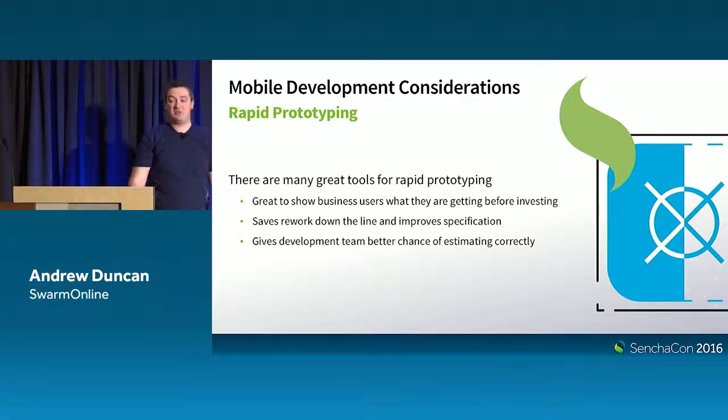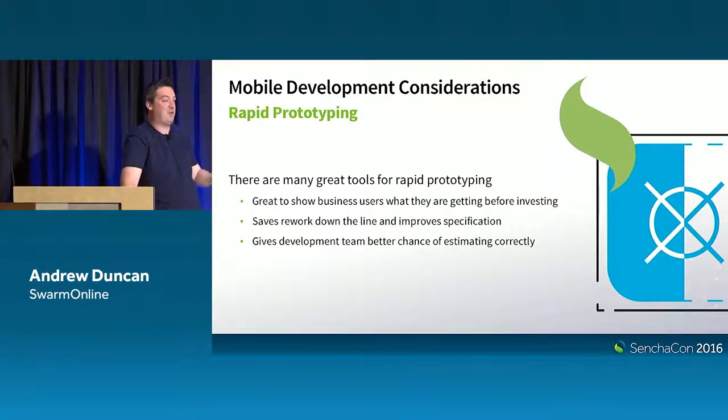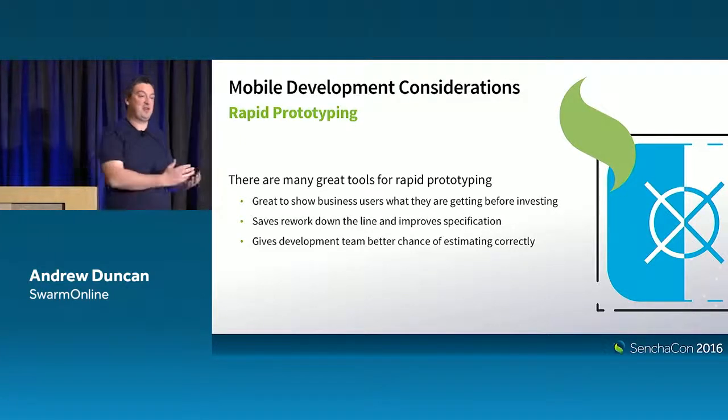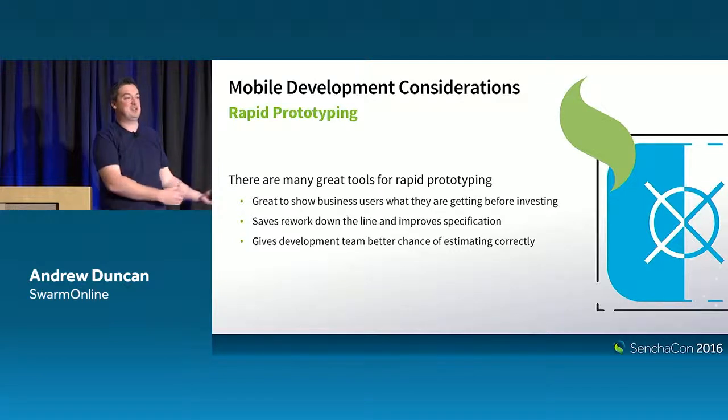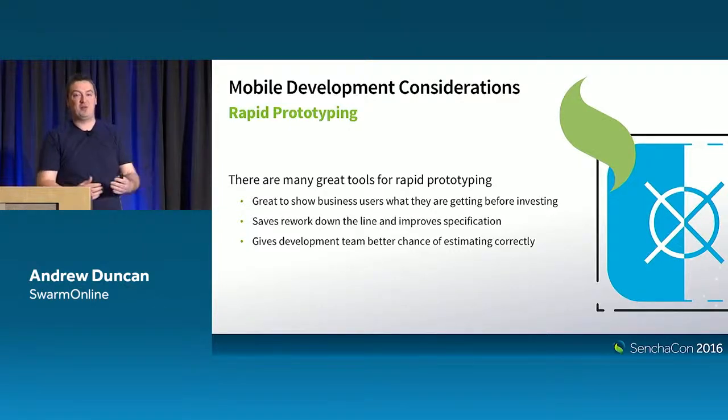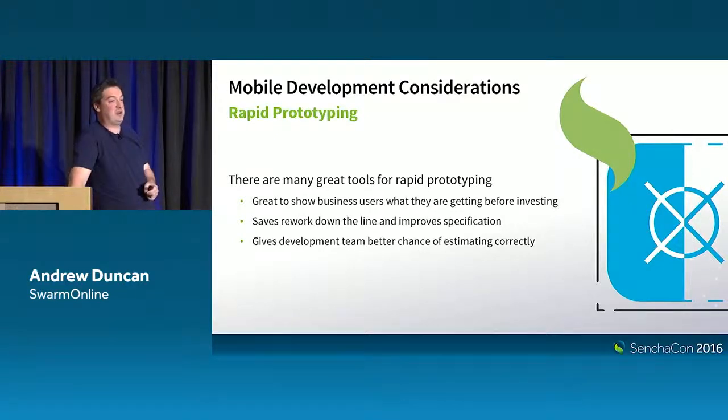But normally we're not thinking about technology at this point. This is a really good way to get your business users invested in the product that they're buying before you ever set your eyes or your team to any coding at all. It also is an absolutely fantastic way to figure out how to estimate the cost or the development time required to make your application. There is nothing like seeing a picture of what you're developing before you actually develop it, and then you can start to break down all the components and the necessary items that need to be looked at, and build up your task list for your Jira Kanban board or whatever you're using.